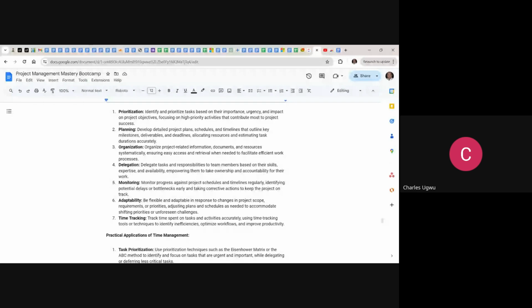before the project starts. That's why when we are planning our project, you see at the project labor, before we start any project, we are planning, I try to identify all the dependencies. These are the critical parts. We've done critical part analysis. These are the critical parts you must identify. These are the areas you should not have a delay. So you must be monitoring those critical parts regularly. It's important.